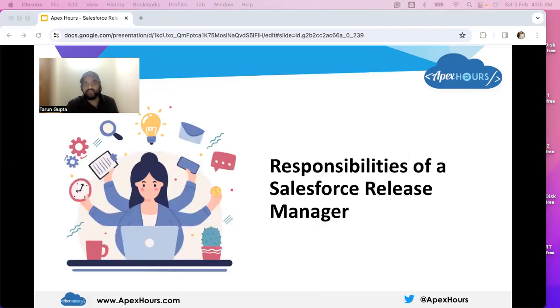As a Salesforce release manager, you oversee the entire life cycle of a Salesforce release: assign release priority, plan deployment, prepare estimation, prepare documentation. That means evaluating estimated release downtime and actual release downtime before release. Release priorities ensure attention to higher priority releases to prevent downtime and coordinate releases by allocating proper resources. Testing before release means conducting regression testing in the sandbox before releasing the project, and minimizing the release risk means minimizing risk and error to reduce the number of rollbacks of the improvement.